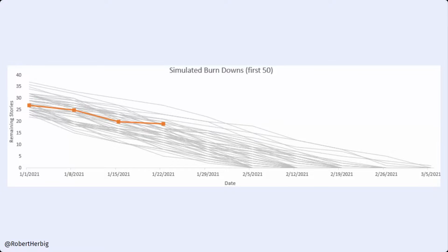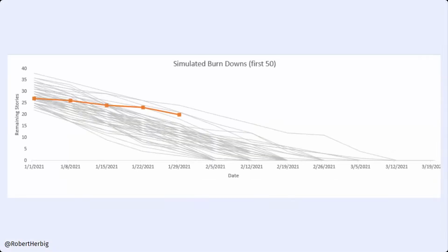But it's also very visual, which again drives those interactions. And we can see here that our remaining backlog kind of leveled off, whether that was through introducing new work or not getting as much done or a combination of them, but that might be a little bit of a yellow flag. Let's have a conversation. Maybe it's not a problem now. We're at the upper end of our probabilities, but if it happens again, we might need to do something about it.